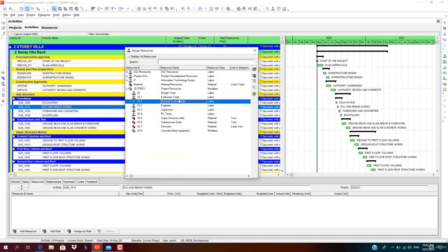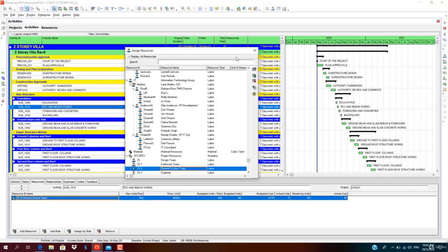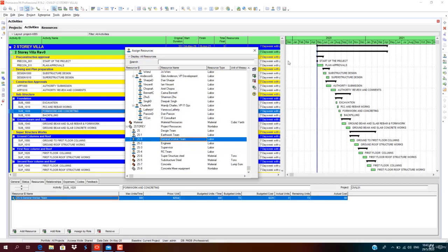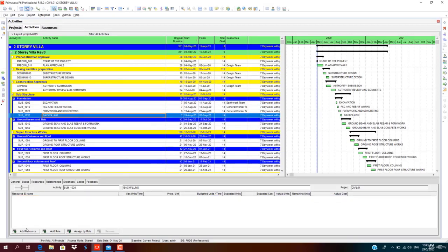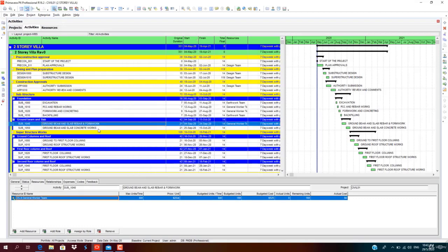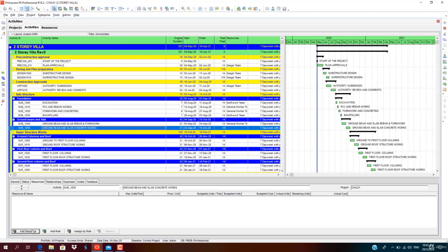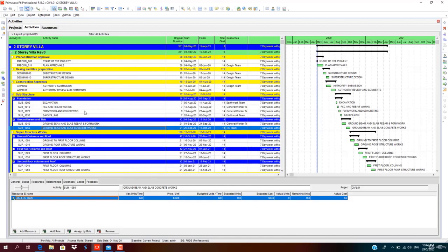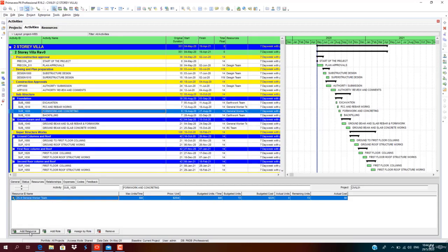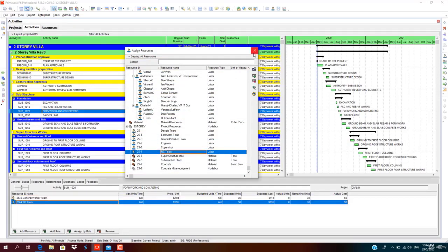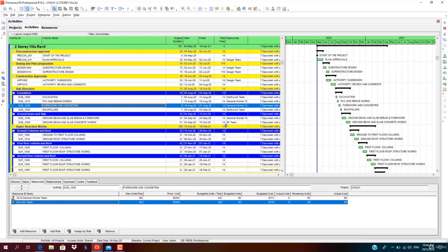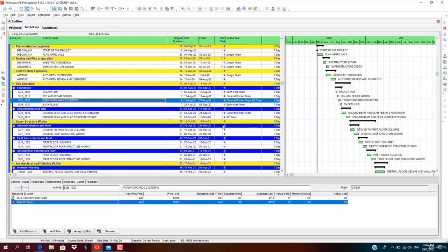resources. PCC and rebar work, general workers team. Formwork and concreting, again general worker team. Backfilling by earthwork team. So concrete works is the RC team. In the formwork and concrete, we need to assign the RC team also. Click again, select RC team. So here you can see the changes. All the resources added are visible in the resource column. Continue to add